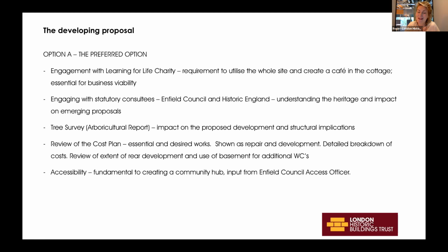The tree survey: I'll show you in a second on the plan that suddenly this tree became incredibly important, and that related to the approach to structural engineering and associated costs. So we absolutely had to have this report done and turn it around rather quickly. A review of the cost plan: I feel like I probably drove Nicola rather mad with looking at the project costs and thinking about what was essential and what was desired in our project to make a project that would be fundable ultimately.